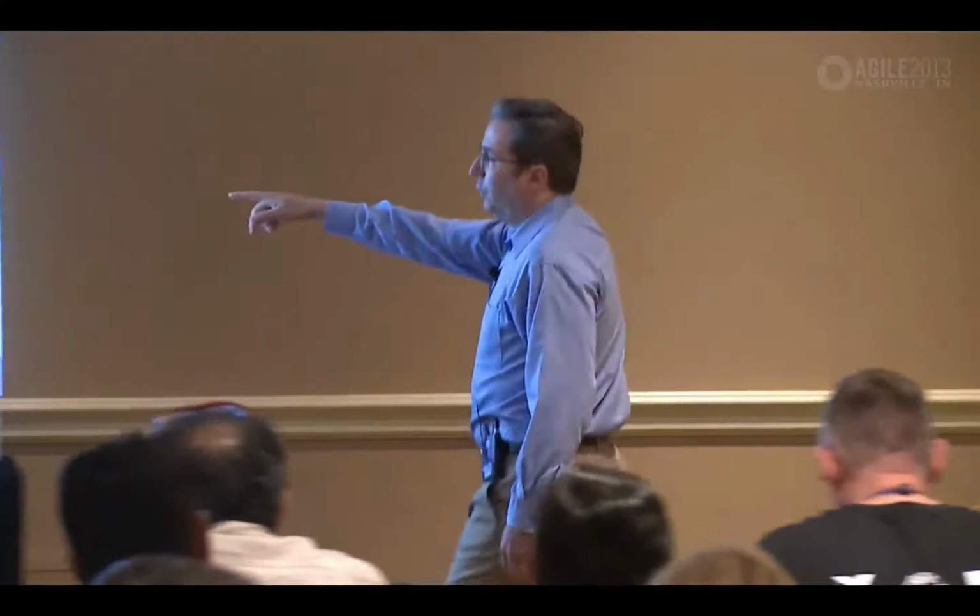Look, I think we all understand the rule in Scrum or in Agile in general for having small teams is based on a number of factors. One is the obvious that the communications channels go up by the square of the number of people. Right? The formula is n times n minus 1 over 2. So doubling the number of people doesn't double the number of communications channels. It goes up by the square.